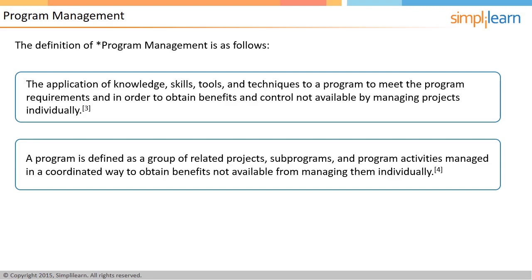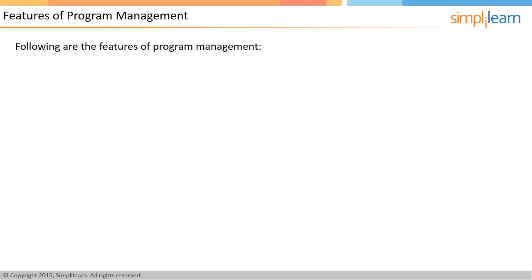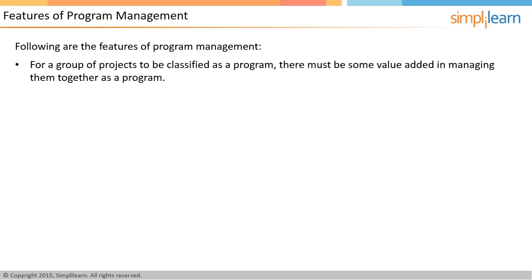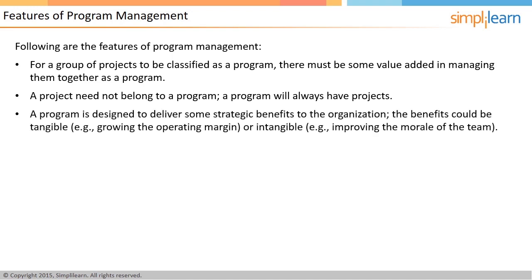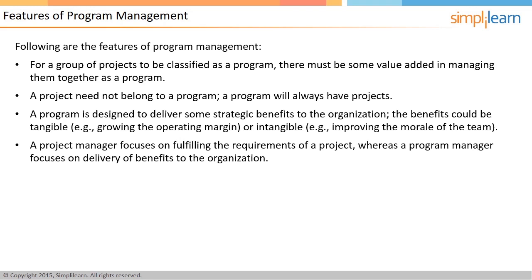Random projects cannot be grouped together as a program. The projects in a program should be related in some way and there should be some value added in managing them together. A project may not be a part of any program, but a program will always have projects. A program is designed to deliver strategic benefits and value to the organization. These benefits can be tangible — such as increased profit margins or operational cost savings — or intangible, such as improved team morale or building competencies. While a project manager focuses on scope, cost, time, and quality, a program manager needs to focus on ensuring that the organizational benefits are realized.